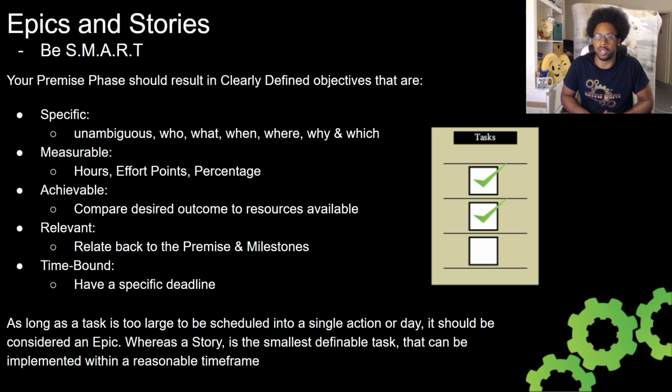For example, let's say you have a character, like I've got characters in Science Symphony who can walk. We want to make it that the character can slide across ice. I've not done that before, but the concept is fairly straightforward. It's just kind of combining and reconfiguring other aspects, and changing the animation sequence that's used and the triggers for activating and deactivating it. With that in mind, I'm sure I could do it, but I would have to learn how to do it first. So there would be a time for learning, a time for experimentation, a time for when things go wrong, and then the actual implementation time. So when I'm planning a project, I would have to take those things into consideration.